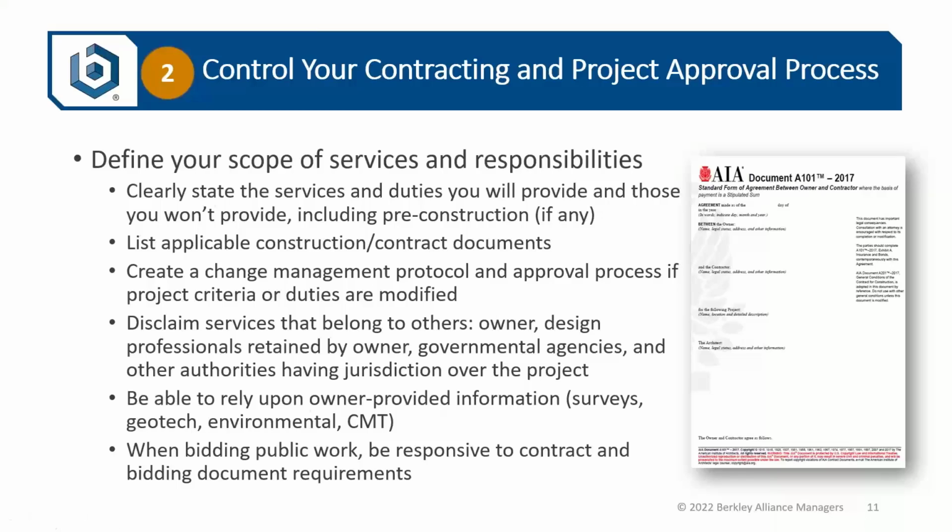Also very important is a change management protocol and approval process if project criteria or duties are modified. So this is not construction change orders. Those are obviously within the body of the A201. But what about your pre-construction services? When things in the pre-construction phase change, you, who are basically providing professional services in pre-construction, have a modification to your responsibilities.